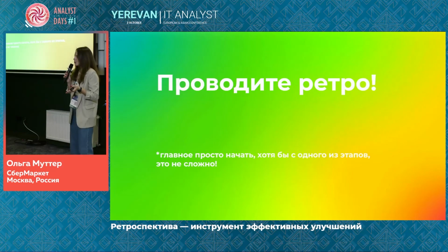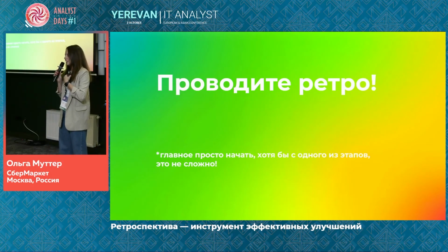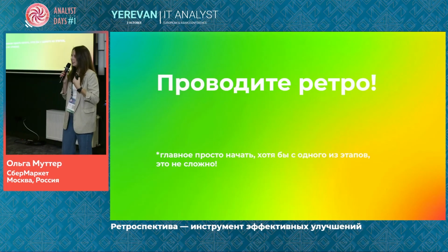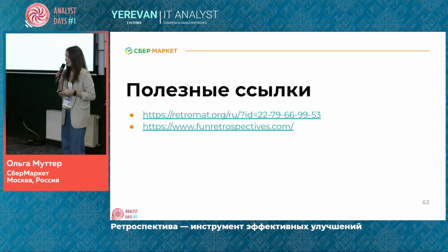And do retrospective meetings. If you think all the 5 steps seem difficult, no, that's not the case. You can do it in 1 hour. And I introduced retrospective meeting practice in companies that heard nothing about agile, etc. And they do see value in that. If you have retro now, add some more phases, opening, for example, and gradually you add more and more.